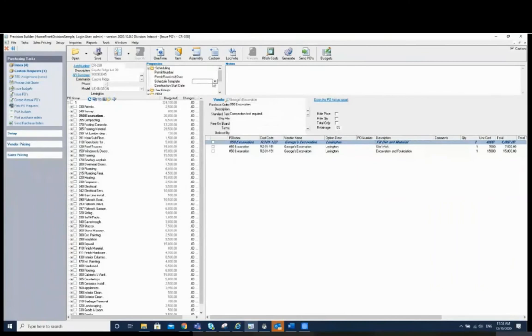Do that. And at the same time, I'm also going to identify, we've got a variety of different scheduling templates. Many times people have different templates that pertain to different types of floor plans that they work with. So I'll choose the template that best represents what I need for this particular home. And when do I expect the initial start date to be? I'm just going to put in next week for example's sake.